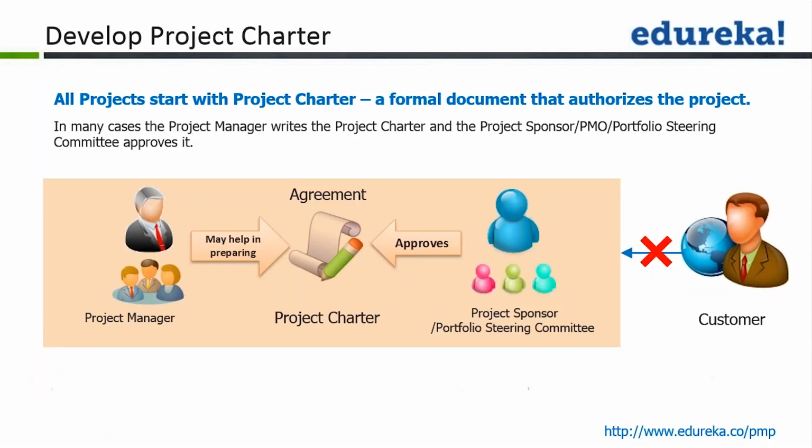Important point to understand here is it is the project sponsor who will approve the project charter. It is not the project manager who will do the sign off. It is not anyone but the project sponsor. And second important point is this project charter must not be visible or must not be shared with the external customer. Sometimes you may have an internal project, sometimes you may have an external project.